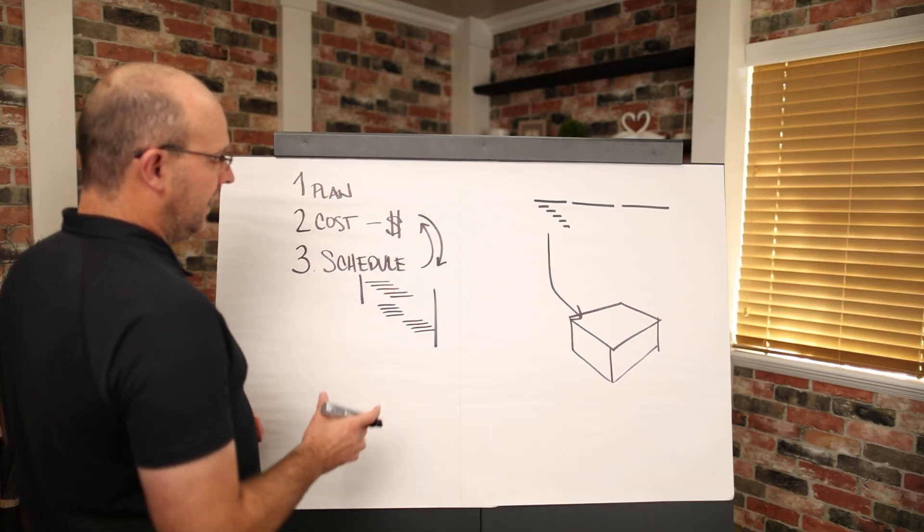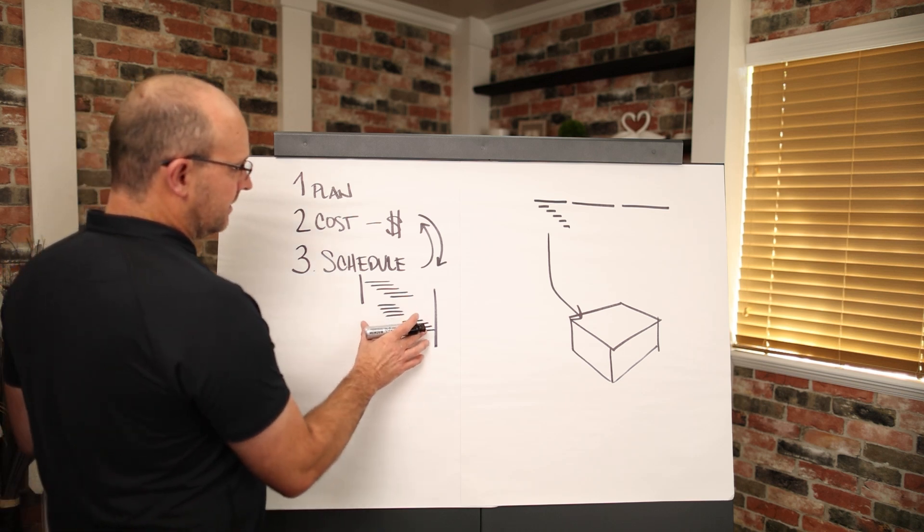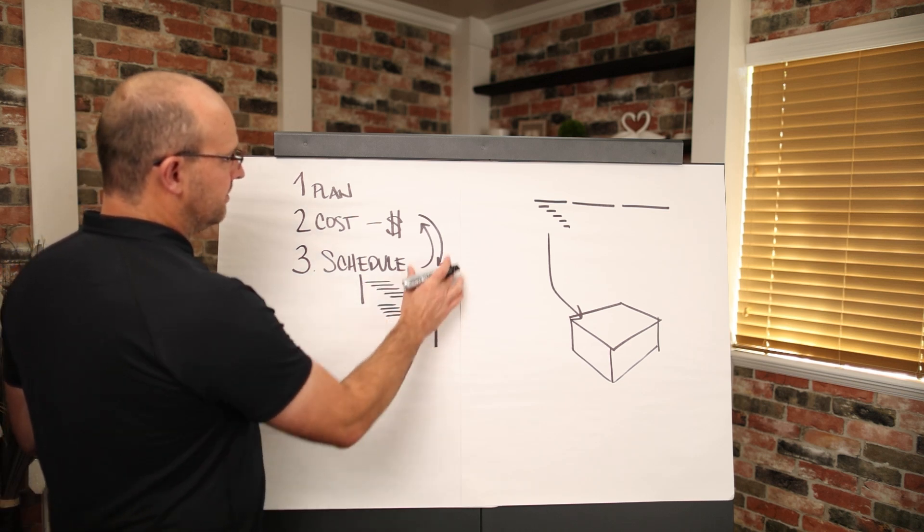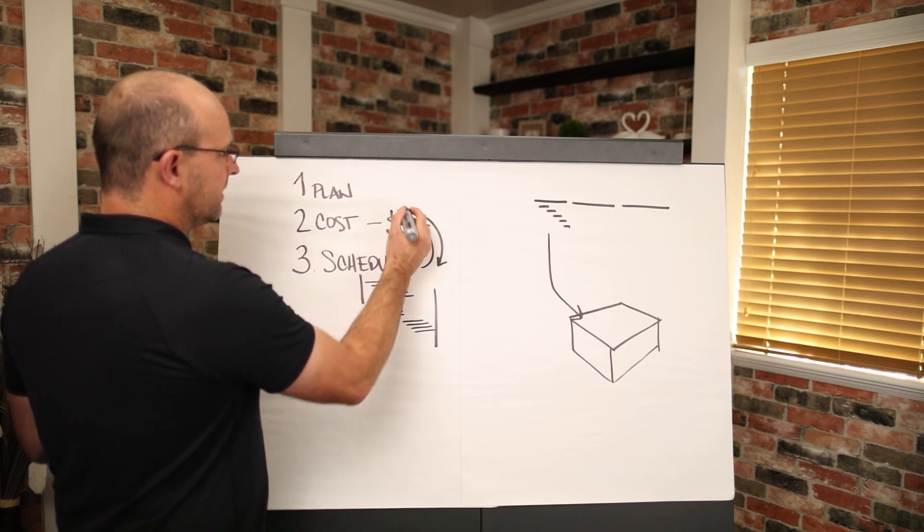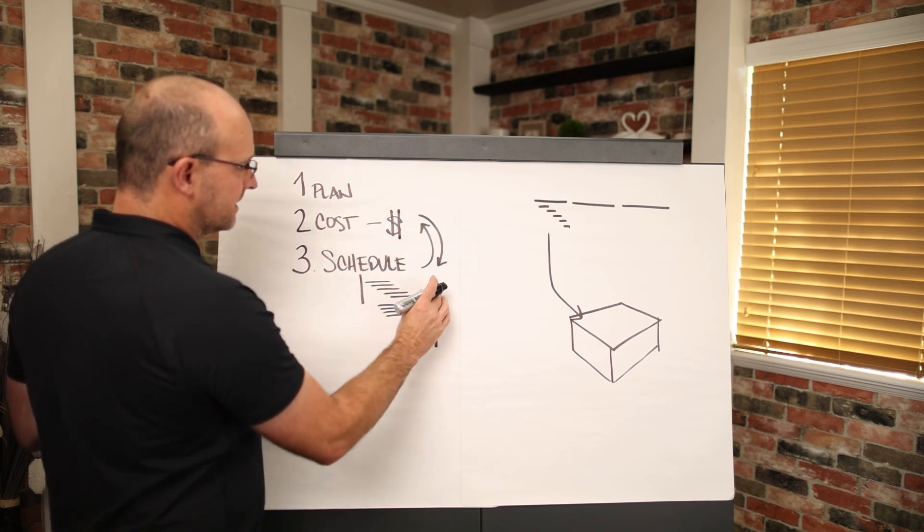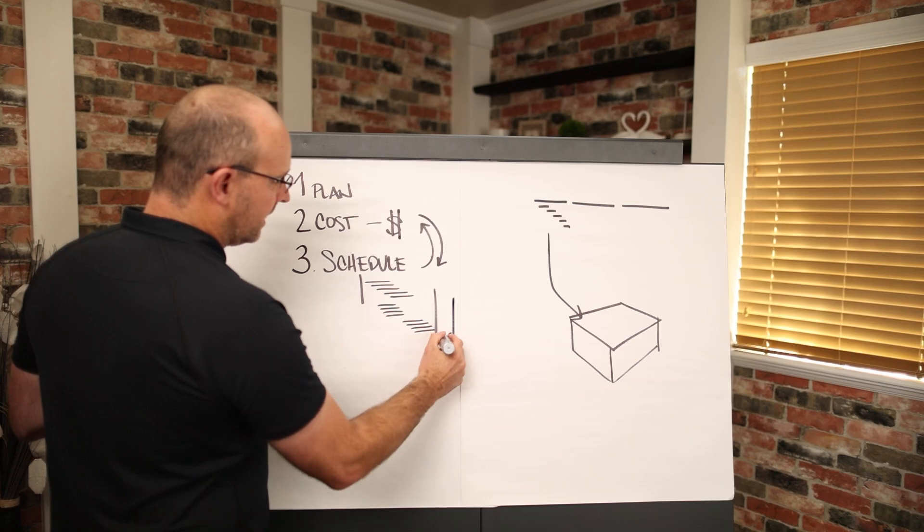So this is absolutely crucial. And again, I just want to say one more time in case it didn't land, whatever your schedule is should be picked up in your GCs and GRs, right? And whatever you have from a budget standpoint should be reflected in the actual schedule without overruns.